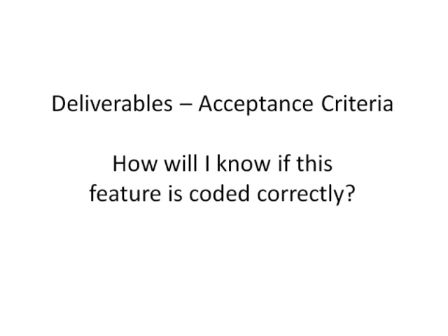Specific details are definitely required. If text is to be displayed, exactly what text? Where should that text be displayed? Because a picture is worth 1,000 words, any feature that includes a graphical design element should also include a basic mock-up to remove any ambiguity when it comes to placement or design of the feature. As a project manager, ensuring that your team creates accurate and complete stories will enable your team for success.